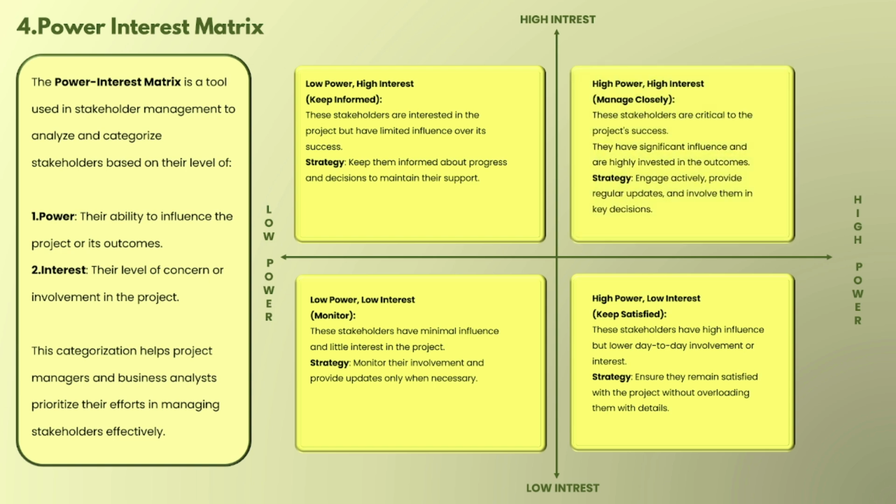And the last is high power, high interest. We need to manage them closely. These are the stakeholders who are critical to the project's success. They have significant influence and are highly invested in its outcome. The strategy is to engage them actively, provide regular updates and involve them in key decisions.